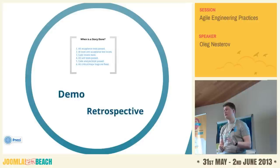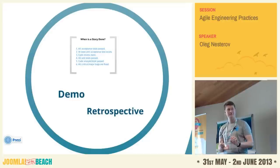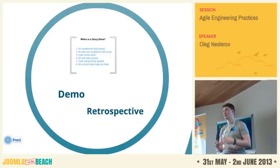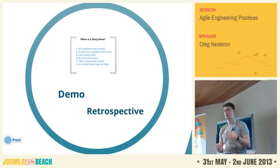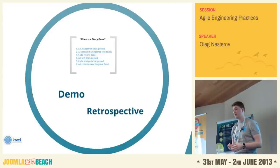How do you know your sprint is done? Your client needs to say so, but they need something to check. If you remember the acceptance criteria, you have those already done. Create a document with all acceptance criteria for each story and send it to the client so they can check and sign off — that's what we started doing recently, so we know the sprint is done and accepted by the client.